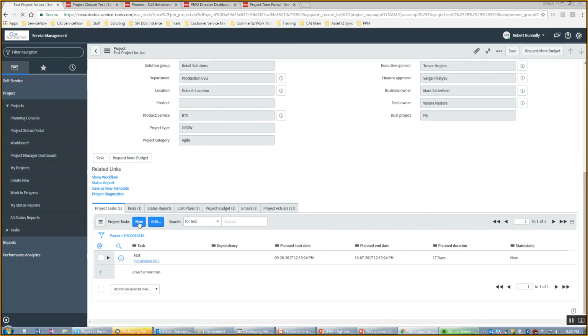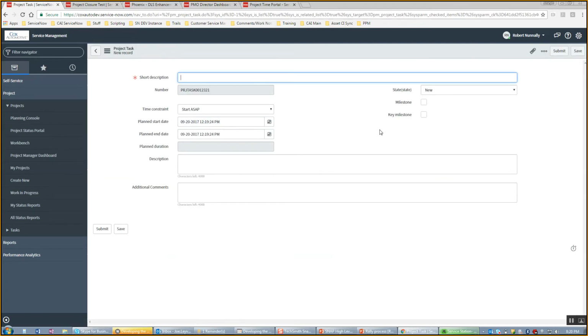Okay. No. Pretty straightforward. You can note it as a milestone or a key milestone, and it's reportable if you want to do so. So if you want to target key dates on your project via tasks, you can then say, here's a key milestone date for us, right? Finishing development or promoting things to production, whatever it may be, as an example. Then you can report on both of those fields if you choose to do so. So be very, very cautious about those planned start and end dates.